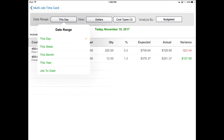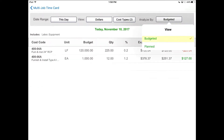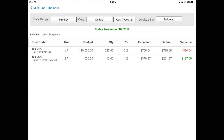A couple other options — you can set the time range for this report. You can set it to today, this week, or this month, and let's stay on today. You can also choose to analyze your production against either your budget or you can compare it against the production plan that you've created. So let's stay with analyzing your production against your budget.